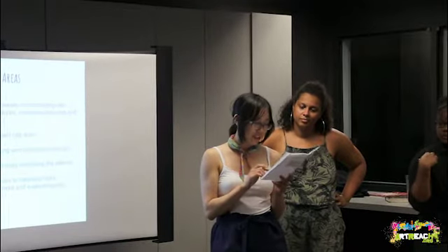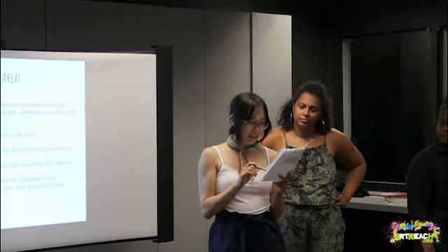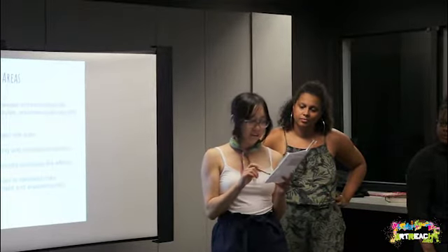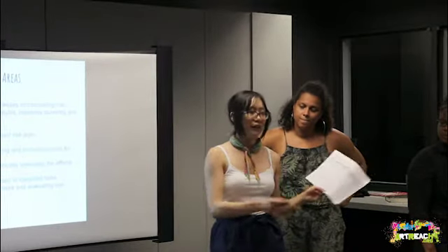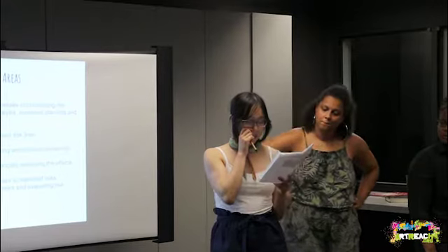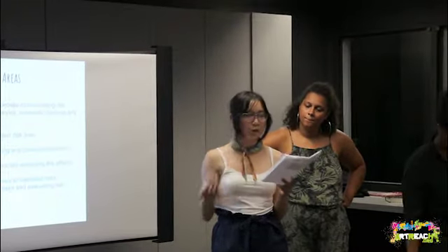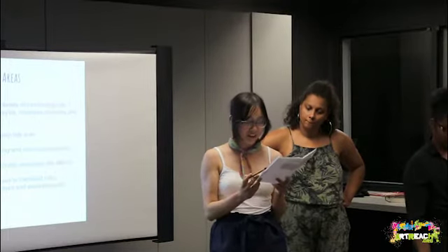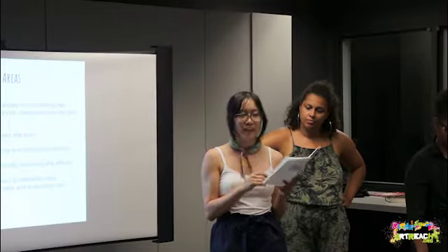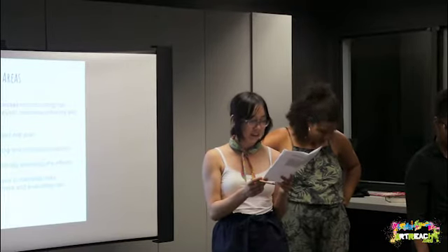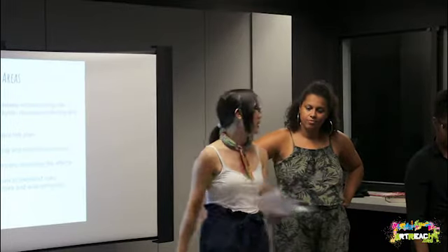Is the insurance. Absent or poorly performing counselor. Again, the training would probably help with that if we put all the training up front. Also the hiring process, like what questions you're asking in the interview, and hiring a backup person in case someone flakes out or gets sick. That is risk reduction, and that was in the middle of our model.